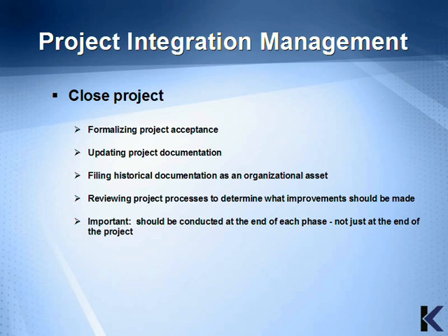In this segment, we'll go through the process of closing your project. Closing your project involves several steps. It's formalizing your project acceptance, updating project documentation, filing historical documentation as an organizational asset, and reviewing project processes to determine what improvements should be made.